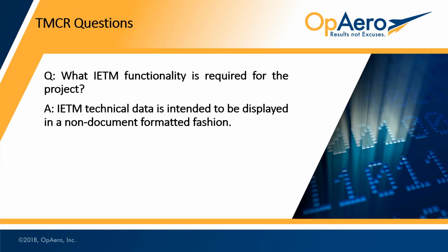All right. So that functionality matrix is provided in the S1000D and allows your projects to define their functionality in specific language. It's more or less a shopping list. Just remember, the more stuff you add in functionality, the more time it's going to take to develop that content.